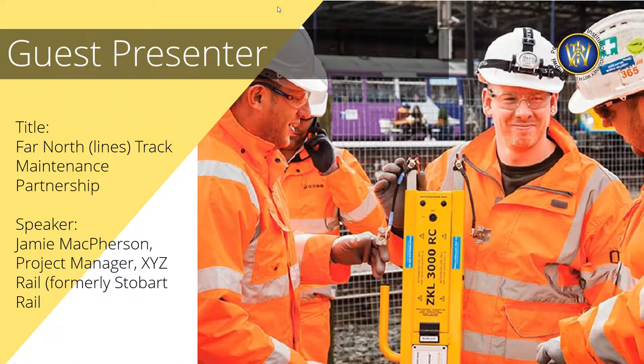Year three, so year two, it was pats on the back for Furzo, the boat coming in for the rail for Furzo. If we'd actually looked a year and a half ahead to year three, we had quite a lump of re-railing up that area as well. So instead of getting the 1150 rails delivered, we maybe should have got it doubled and delivered. I think that would have been a lot better logistically to get that rail to that area.